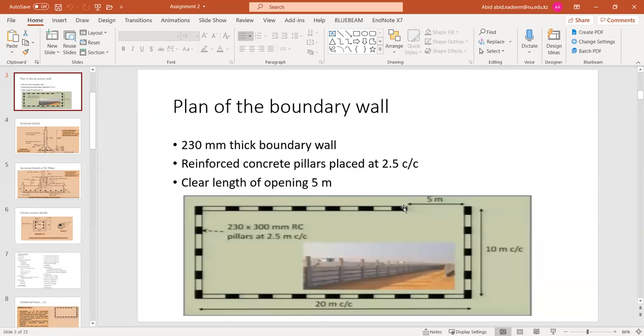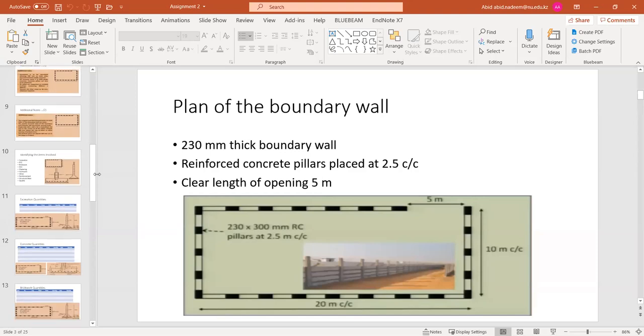One column after the other. Okay, so depending on the productivity of the workforce, it's not like a one day job. It may take maybe 2 or 3 days, something like this, to complete this project. So as a construction manager, you can decide that once they complete the work in this site, and then plus there is a lag, because again concrete is involved over here. So you have to provide a lag for the curing of the concrete, maybe 3 days or whatever. Then after that lag, the brickwork can be started.